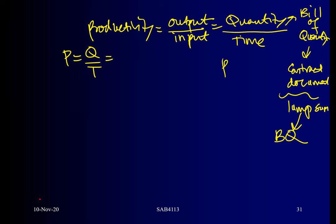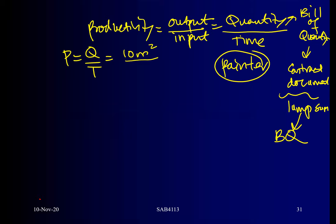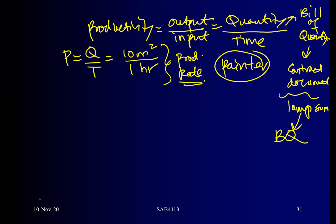Going back to our equation: P is equivalent to Q over T. For example, let's say a painter — one laborer — can paint 10 square meters of wall per hour. That is what we call productivity rate. When the word 'rate' is there, something must be divided by something. Note that productivity rate and unit rate are not the same — unit rate is meant for cost, how much an item costs per unit.